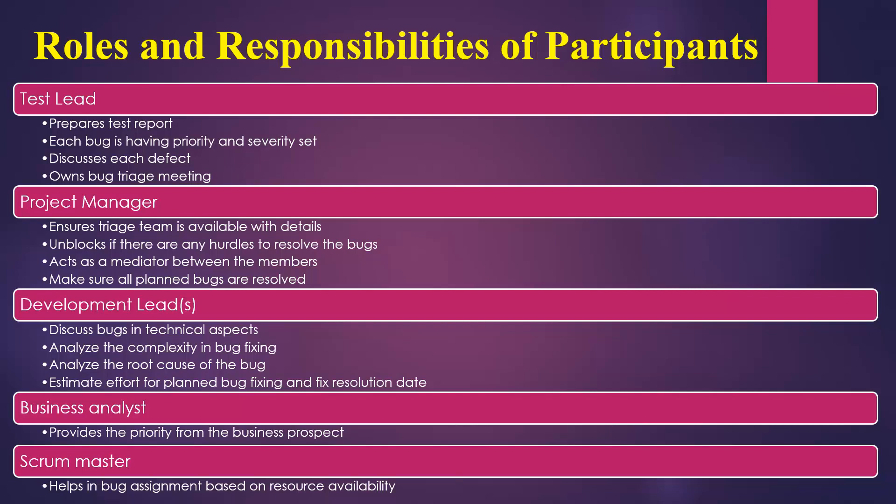The development lead, or leads if more than one, discuss bugs from a technical perspective: what caused the bug and why it arose. They provide technical insight, analyze the complexity of each fix — identifying whether a bug is a small fix with big impact or too complex to fix — and analyze the root cause. Finally, the dev lead estimates the effort required and gives a resolution date, which helps with release management planning.